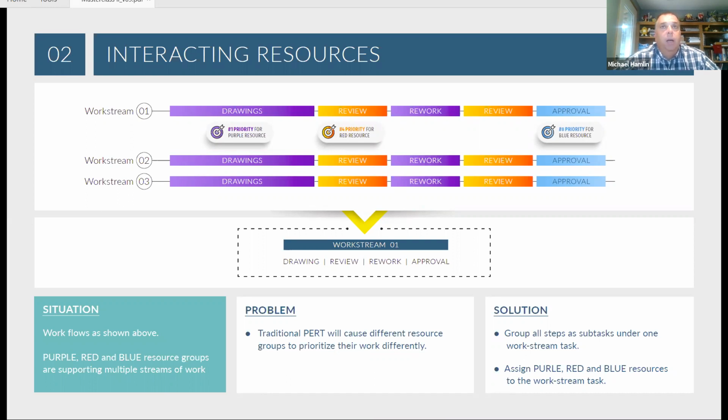But it's this idea of doing the review, the rework, and the approval all at the same time: pulling everybody together, taking the drawing, finalizing it, and being done. We have found that where these streams could typically take 2 weeks or even longer to get from the drawing to the final approval, organizations can now finish the drawing and have the approval done within a day or less.